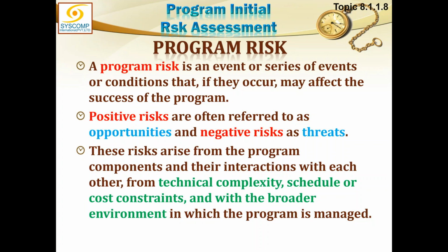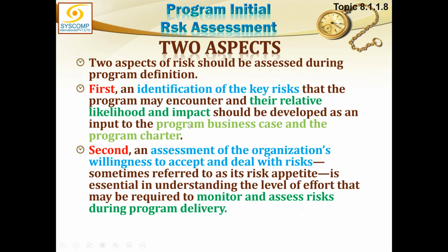So these risks arise from the program components and their interaction with each other, from technical complexities, schedule and cost constraints, and with the broader environment in which the program is managed. These risks could come from anywhere. Two aspects of risk should be assessed during program definition. First, an identification of the key risks that the program may encounter and their relative likelihood and impact should be developed as an input to the program business case and the program charter.